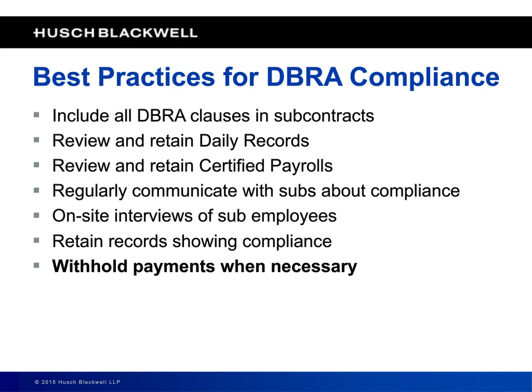But let's look at a high level at what some best practices are. Obviously, you're contractually required to flow down the clauses. You cannot subcontract away Davis-Bacon Act compliance by introducing multiple tiers. It applies at all tiers. So anybody who steps foot on that job, and by the way, it's beyond the scope of my talk today to talk about secondary sites of work and things like that.